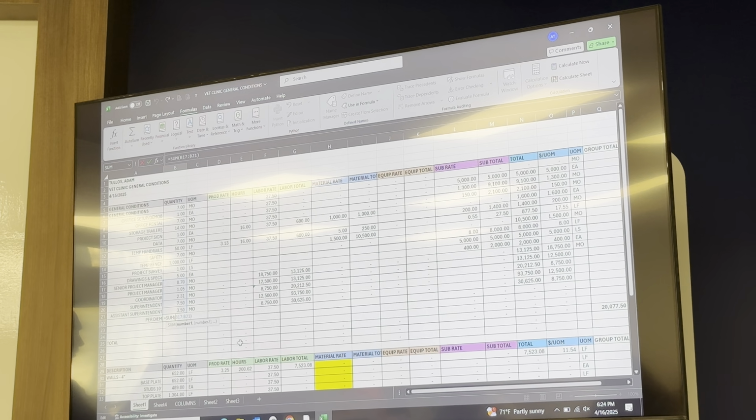This is a somewhat simplistic look at it. Your senior PM's probably not gonna be actually spending any time on the job site, like, he's not gonna be spending the night. So per diem is to cover hotel room, food, if the project is out of town. So if we were to send somebody, say, to Mountain Home, Arkansas, which is like 3 hours from here, they're gonna get paid per diem.